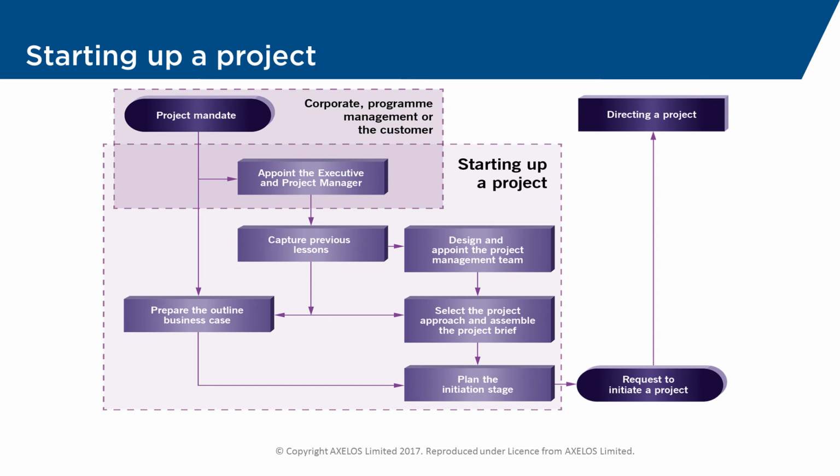All of this information will be pulled together into a single document or folder called the project brief. And this is what the project board will use to make a decision whether to go ahead or not. This shouldn't be a surprise because they're going to be involved in helping to build the project brief. However, we do need to gather all the documents together for them to look at and make their decision.